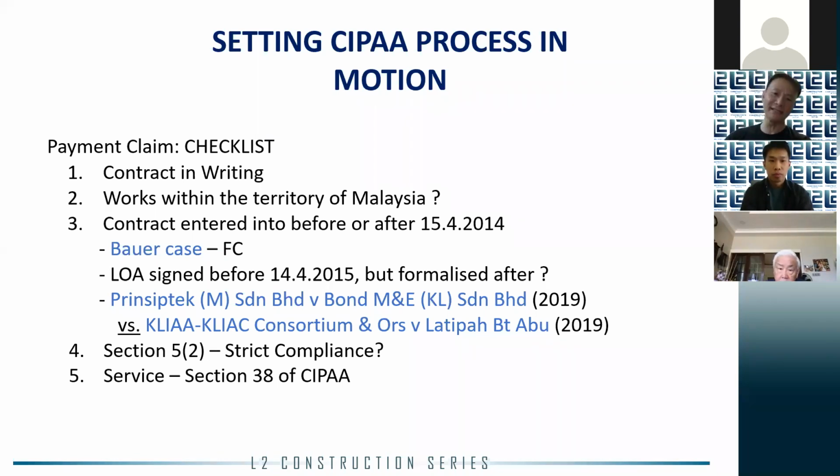So what that means is that if a construction contract was entered into prior to 15th of April 2014, the parties to the contract cannot then resort to CIPAA proceedings. Now, there is some controversy, there are some fine line, borderline cases.